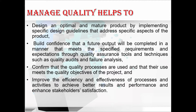One important point: Manage Quality is considered the work of everybody — that is, the project manager, the project team, the project sponsor, the management of the performing organization, and even the customer. In agile projects, quality management is performed by all team members throughout the project, whereas in traditional projects, quality management is often the responsibility of specific team members.